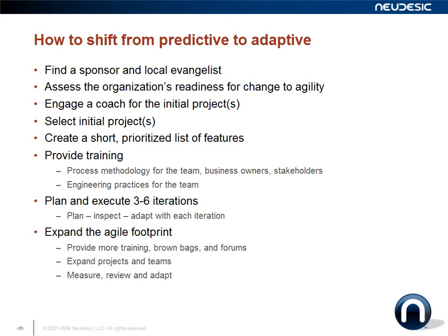Once you get through your initial three to six iterations and your teams are beginning to function as high-performing teams and you're beginning to see the benefits, you can start to expand the agile footprint. To do that, you'll want to provide more training — brown bags, forums, ask-the-experts sessions. You'll expand projects and teams, picking another set to expand to and setting them on a course for their initial three to six iterations. Measure, review, and adapt again, and continue expanding your agile footprint until you have as much of your organization covered as needed.